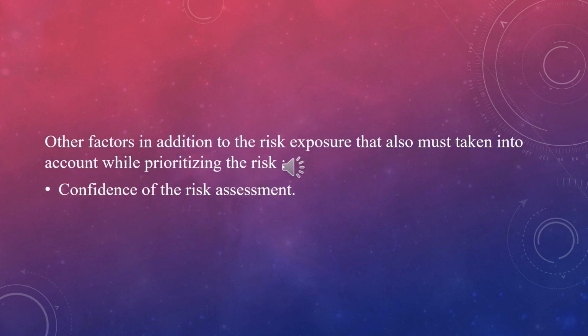The first factor is the confidence of the risk assessment. Some of our risk exposure assessments will be relatively poor. Where this is the case, there is a need for further investigation before action can be planned.